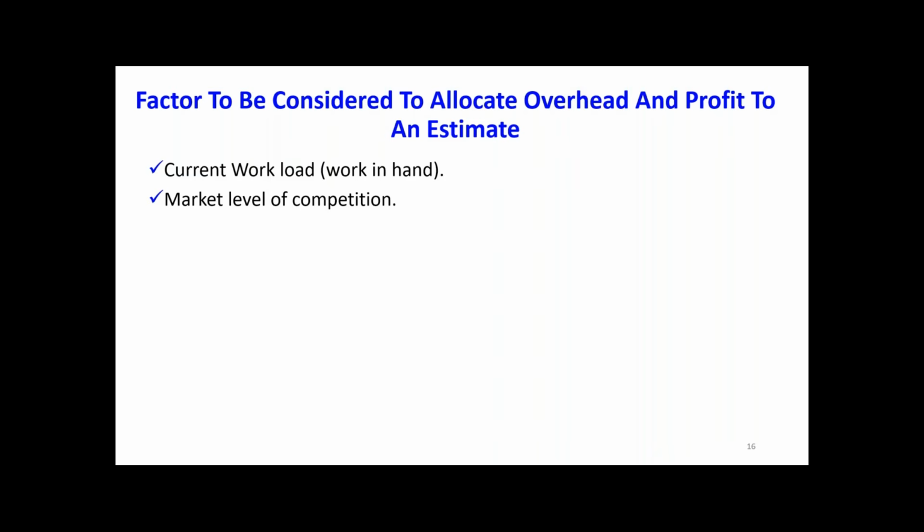Very good. It's going to be low margin because you want to win in the competition. As you know, the actual cost of the project cannot be adjusted. That remains the same. Only in profit and overhead margin can we play. So if you don't have many projects, then you are going to go for a lesser margin.